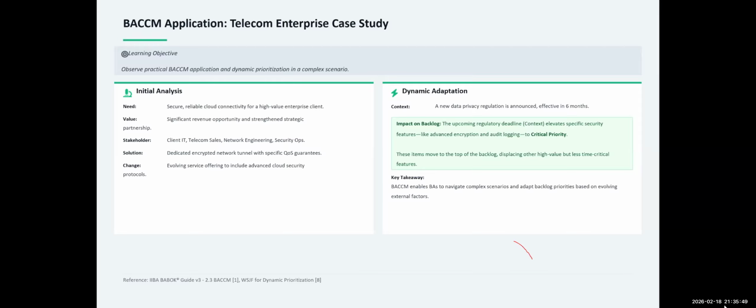We have a whole lot of checklists to say, can this item in itself be developed on its own? Is it independent? If we use INVEST, right? Is it clear in terms of requirements? Are there dependencies? Is it valuable, right?